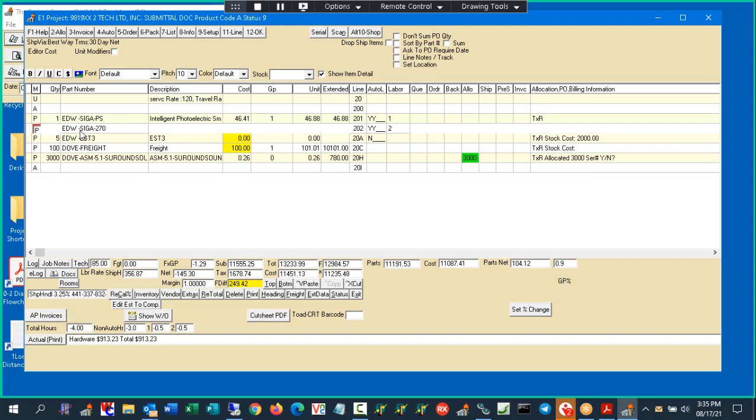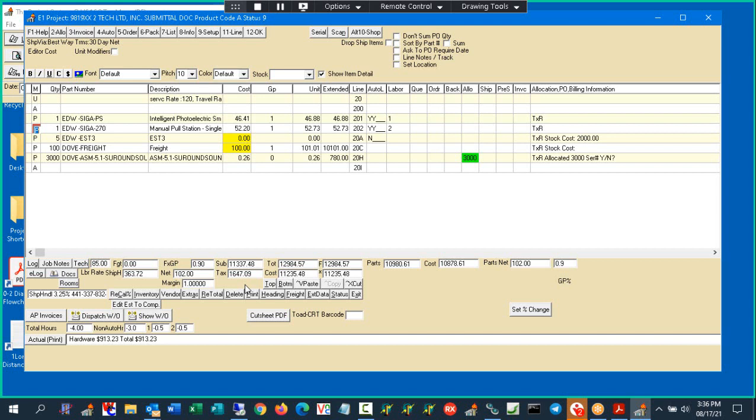So we don't know why it changed or how it changed. All we know is it changed. What the change order control module does is it lets us control who adds those items, and it's permission-based functionality so that you know it's been added. And two, the idea would be to make sure that the change order was either internal, i.e., we're going to absorb any cost differentials, or external, which is a selling price change to the customer. And it allows you to do those very things.